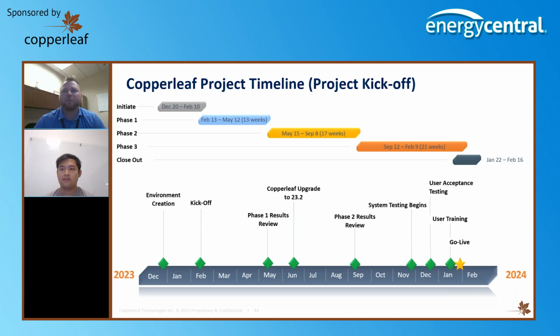And then we added the remaining asset families, and then we added all the details around the substation, the substation-level data that's not necessarily categorized in an asset family: control cable age, condition, erosion issues, and other things that allowed us to then move into making those full hybrid and asset-specific replacement stations.